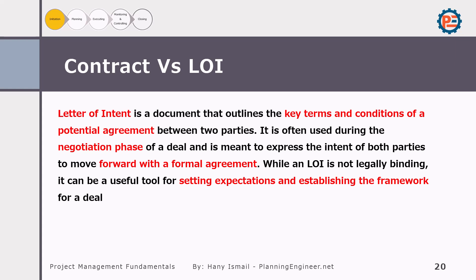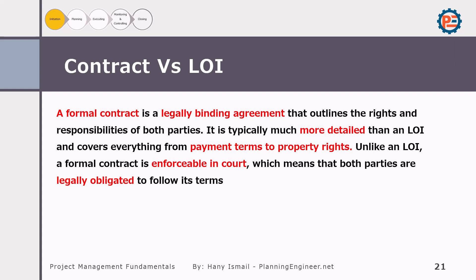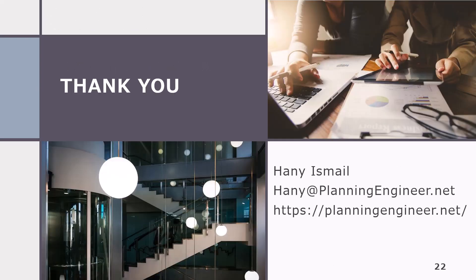Understanding the difference between an LOI and a contract is important. The letter of intent is not legally binding but is useful for setting expectations and establishing a framework for the final agreement. A formal contract, however, is legally binding. A contractor might start talking with banks, subcontractors, and employees upon receiving an LOI — making interviews, collecting prices — but cannot take action on the ground without a signed contract. Once the contract is signed, hiring, issuing bank bonds, and purchasing goods can begin.